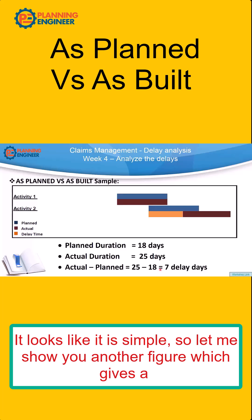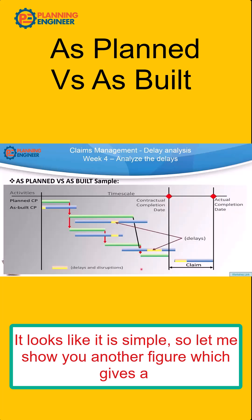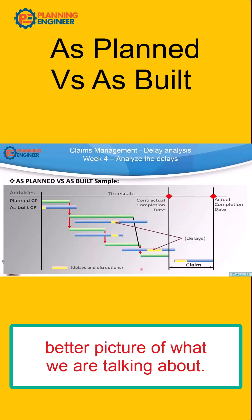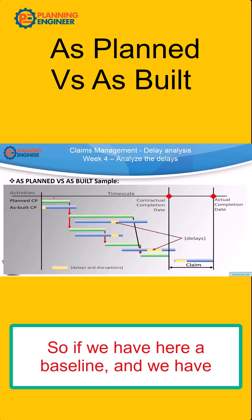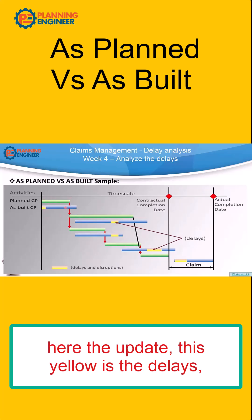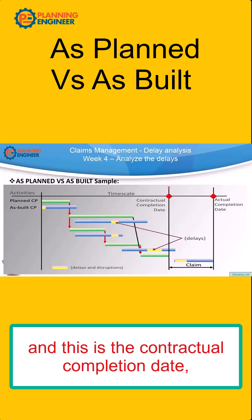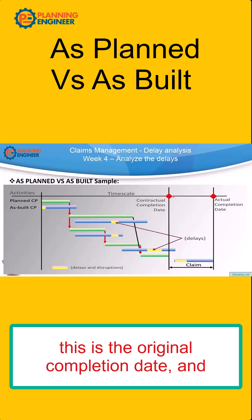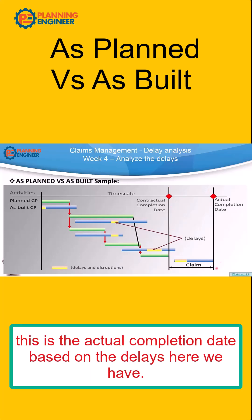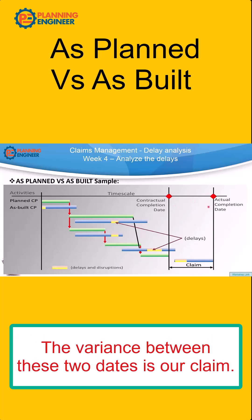Let me show you another figure which gives a better picture of what we are talking about. If we have here a baseline and the update, the yellow represents the delays. This is the contractual completion date, this is the original completion date, and this is the actual completion date based on the delays. The variance between these two dates is our claim.